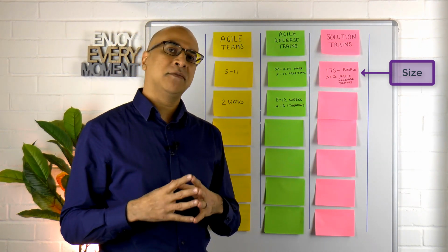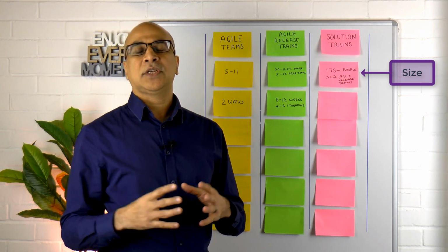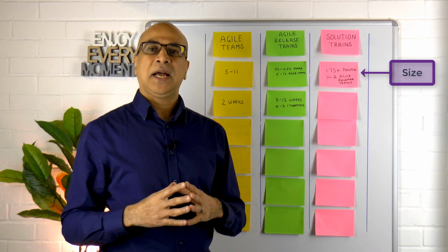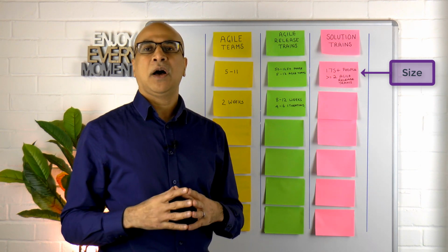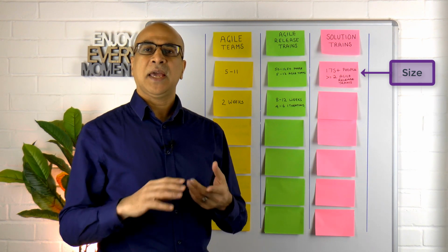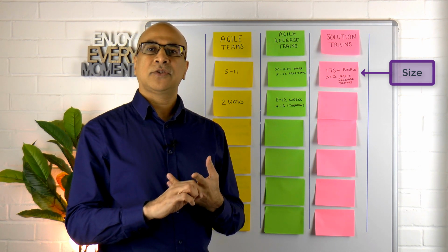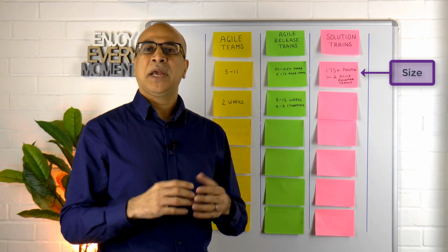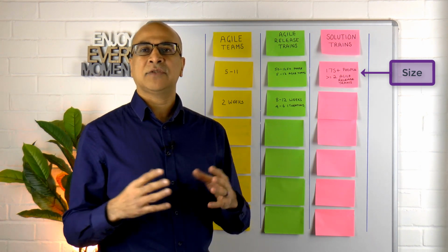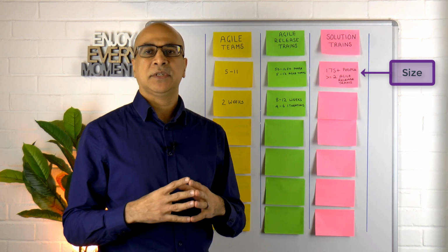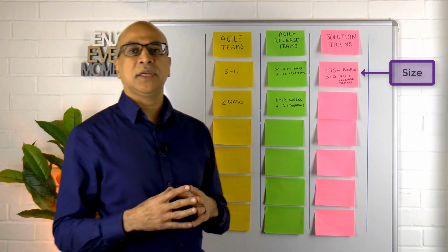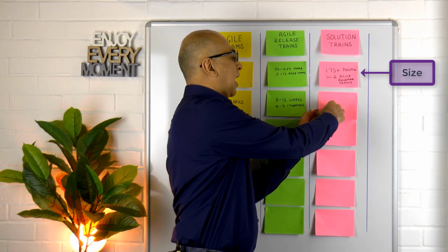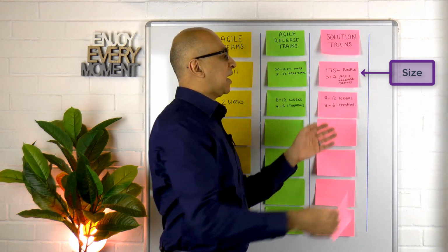Now remember, you might have your innovation and planning sprint, which is your last sprint, which we keep available, and we don't plan actual work inside there because we are keeping a buffer in there. We are making sure that we can do some learning and innovation and preparing for our next PI planning event, as well as running other events like our Inspect and Adapt inside the second week of the innovation and planning iteration.